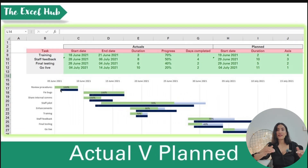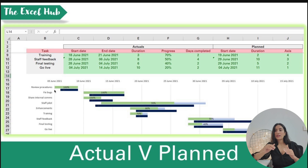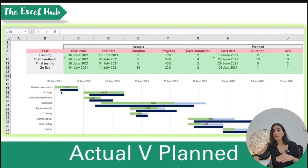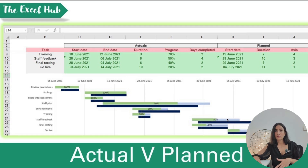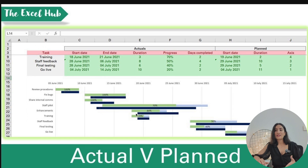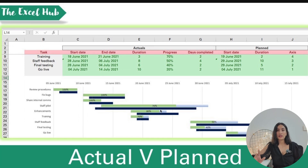Another great way to use Gantt charts is for retrospectives: you can have an ideal planned Gantt chart plotting and then also the actual Gantt chart plotting. If something planned for four weeks actually took five weeks, you can go back and see that it was underestimated and think about how to improve it next time. So you can do retrospectives by comparing the original planned versus the actual execution picture of your Gantt charts.